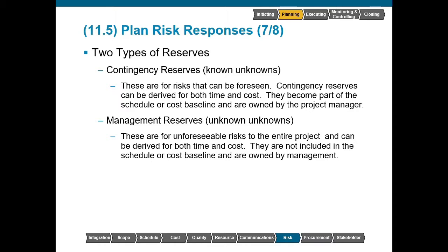Now, these reserves could also be for time and cost, but they are not included in the schedule or cost baseline. These reserves are owned by management. When we say management, we mean the senior management of the organization. So it may be the sponsor, maybe the project management office, it could be somebody at the corporate level, but it's going to be somebody above the project manager. This is where we'd have to use a response strategy of escalate in order to access these reserves.